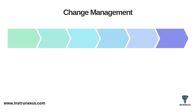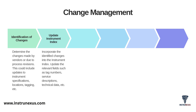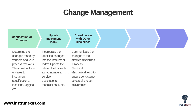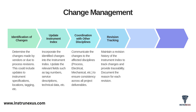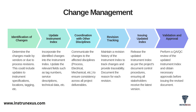A project is never static, so you must have a robust change management process. The workflow is straightforward. First, you must identify the changes, whether they come from vendors or from process revisions — this could be an update to a specification, a location, or a tag. Second, you immediately update the instrument index, incorporating those changes into the relevant fields. Third, you must coordinate with other disciplines, communicating the changes to the process, electrical, and mechanical teams to ensure everyone stays consistent. You must use revision tracking to document what changed and why. Finally, you issue the updated index after it goes through validation and approval, ensuring all stakeholders have the latest version.